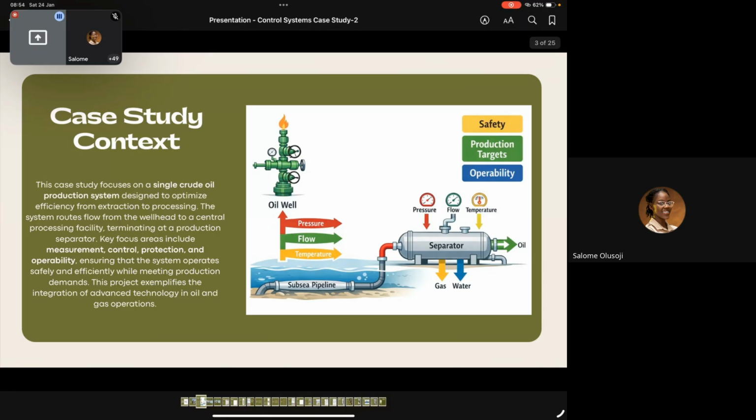And then your detailed design, that is 3 months. All of those activities in that detailed design, you will create what we call a WBS, right? When you're planning the project, each single task will be identified and it will have an identity. So it's a subjective thing. There is no hard and fast rule for you to assign the weights. Bottom line is it's an estimate that you just put together.